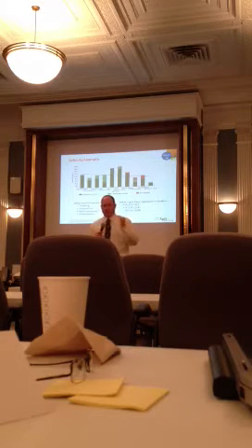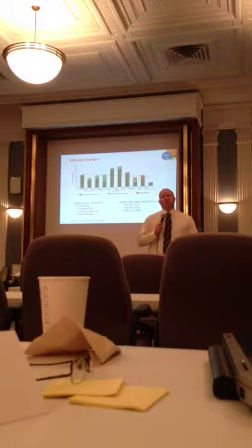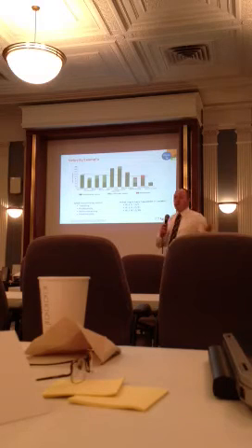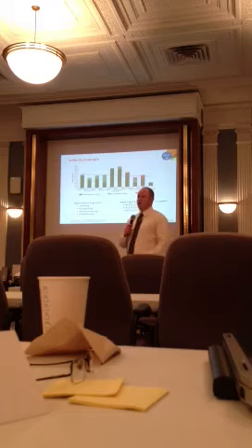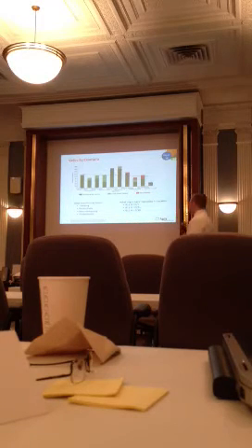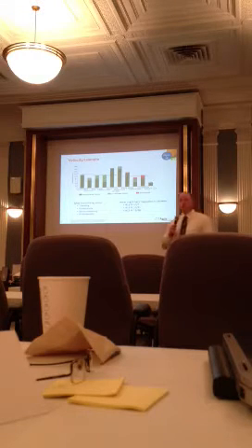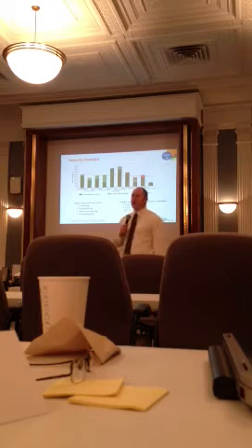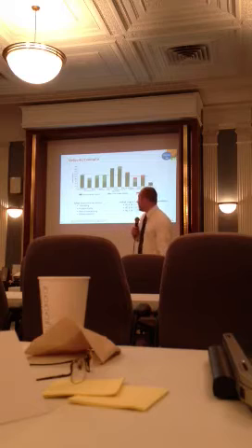And we'll get to that in the next chart. But the idea being, you don't want to waste your time doing something that's not going to add value, right? In this case, they asked us to do something, and then in the middle of the iteration, they said we don't need it anymore, and it's no longer going to add value. So we just stopped working on it. Now, we get to the next iteration, and those 2 people ramp off because we had delivered the expected value that they wanted, the additional increased scope, right?